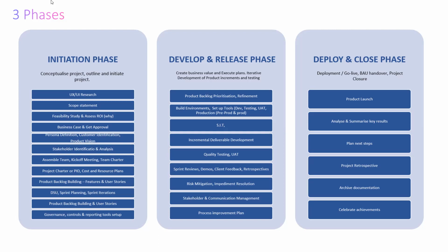UAT would need to come before you do your product launch. UAT is not here. UAT is after you finish everything that has to do with your development and you've done your system integration testing. So deploy and release is after you've done whatever you need to do, that you can do your SIT. And then you do UAT, which is user acceptance testing. Does that make sense?